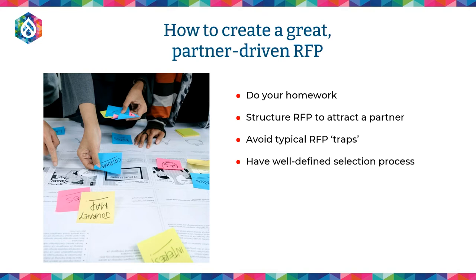And then also, you can really optimize your procurement workflow, working with not just the people that are looking for the solution, but also dealing with legal and procurement and working all those kinks out so that you can get started sooner rather than later. We've won RFPs and then they're willing to start right away, but then the project's delayed for 6 months because of legal or procurement issues. So doing it properly can really help cut through that.